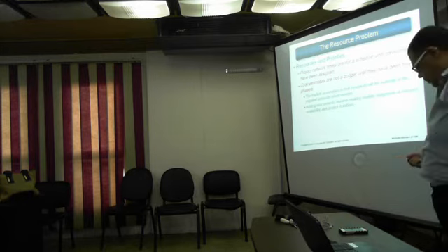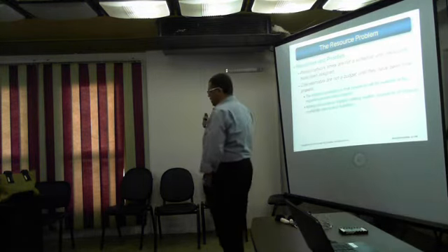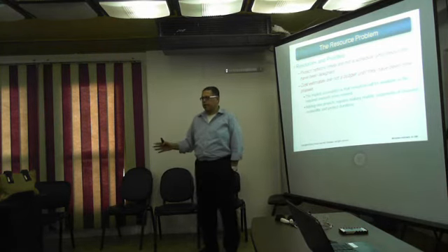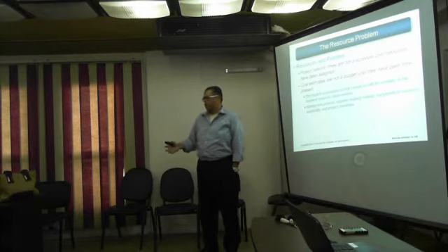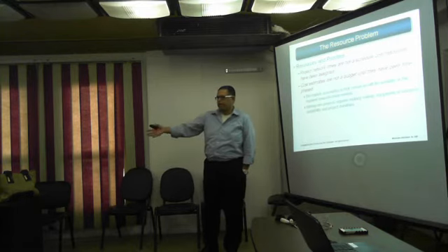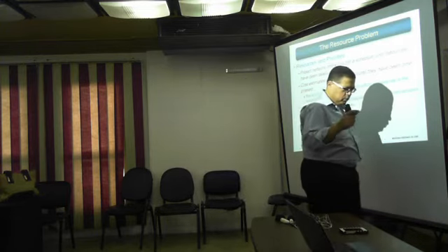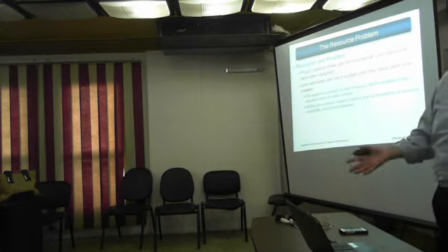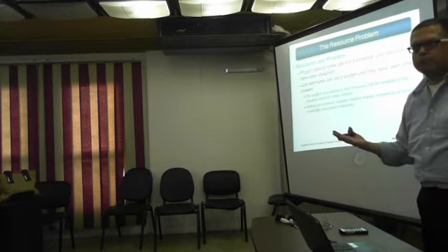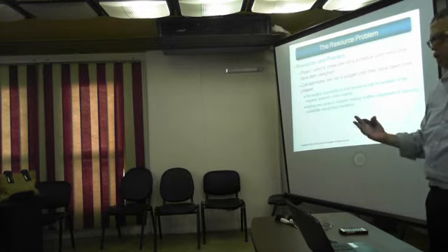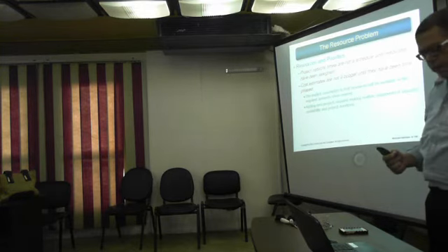Okay, yes, they set the budget for the project like $5 million, and it's in the bank. Are we going to leave it in the bank? Are we going to withdraw 1 million, let's say today, and 1 million next week? Or we need to know exactly when do we need the money? In order to buy something, in order to pay the wages, in order to perform the activities of each activity of the project. Okay?